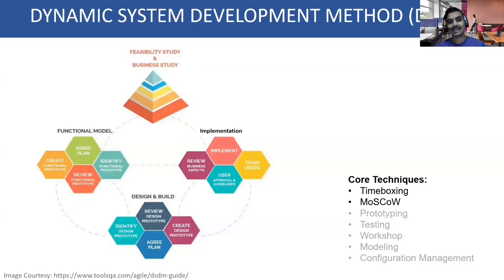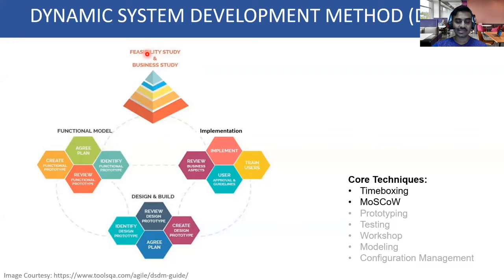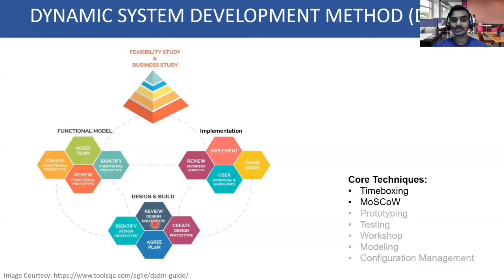Starting with DSDM — early 1990s, migrating from green screens to graphical UI. The remarkable standout was something called prototyping. The method works like this: the team comes together to do a feasibility study — do we have people, is this the right project, do we have money? Followed by a business study assessing the business. If those two are done, you move on to creating a functional prototype, which goes through an internal circle of identification, agreeing, and creation. Once done, it goes to the actual review build-out, a much closer design prototype of what you're really going to build, then implementation — pretty much like a typical product lifecycle.